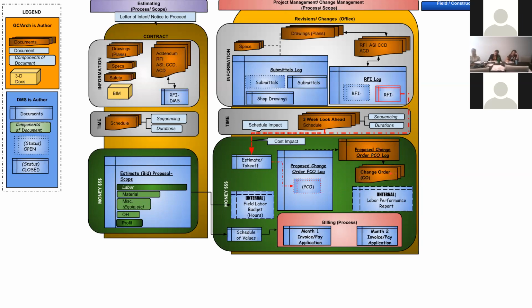The change order number, like let's say change order number 1, can pay for either single PCOs or multiple PCOs. So you might have 5 PCOs out there, and one change order may encompass 5 PCOs. So a change order may grab all of them.